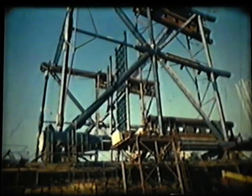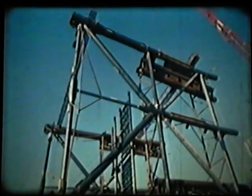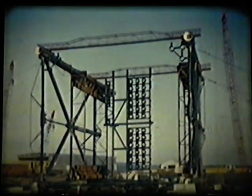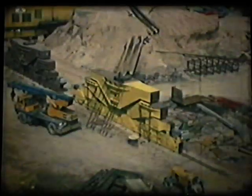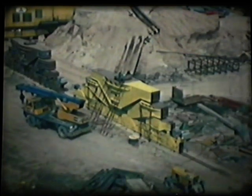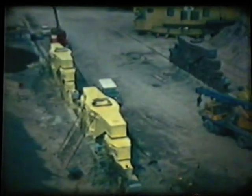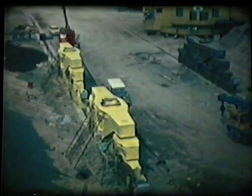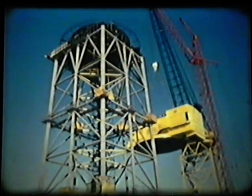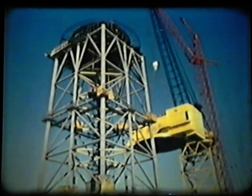A month later, the second roll-up has taken place. The first sets of conductor guides are also in position. This is the upper end of the structure lying on its side, and the heaviest lifts of all will take place at the other end. To prepare for this work, the erection of the second and bigger rail-mounted crane had started. These bogies were soon followed by the tower and then the engine housing. This crane would have a 550-ton lift at 70 feet radius.